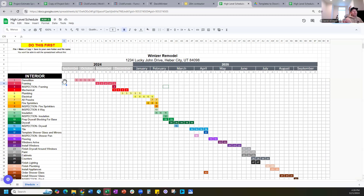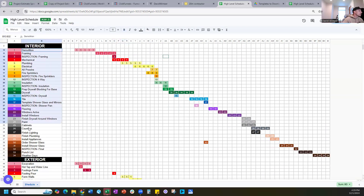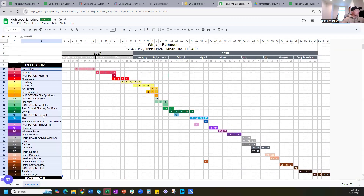Each box represents a week. If you're doing a two-month remodel, you might want to track it daily because it's such a short schedule. But over the course of 18 months, you might want to track it week by week. Each column represents the week of the 9th, the week of the 16th, the week of the 23rd, and so on. December in 2024 has five weeks in the month. That date setup will be the most time-consuming part, and building out the tasks for interior and exterior will be the second.